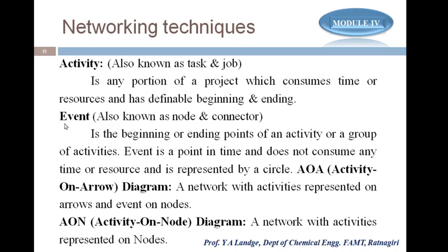Okay, so the event has the beginning as well as the ending point of the activity or group of activities. This event doesn't consume any time or resources, and most of the time we denote the event by a circle.